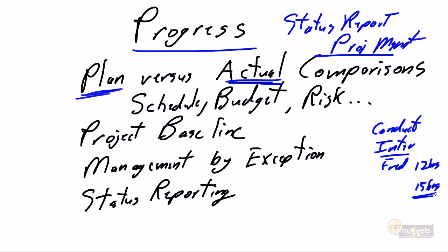Okay, I understand. It's too bad you had to spend that extra time, but I'm glad you did it well. Perfect job, Fred. Thank you very much. But now we have a 3-hour variance on our project. Now, in and of itself, a 3-hour variance is a challenge. Technically speaking, taking this single task, taking 3 hours longer than expected, means our project will probably be 3 hours late delivering. Now, if this is a 6-month project and you're talking about one resource out of 10 delivering 3 hours late on a task, that's going to wash out.